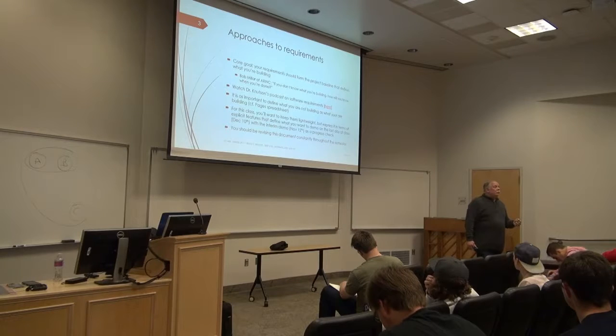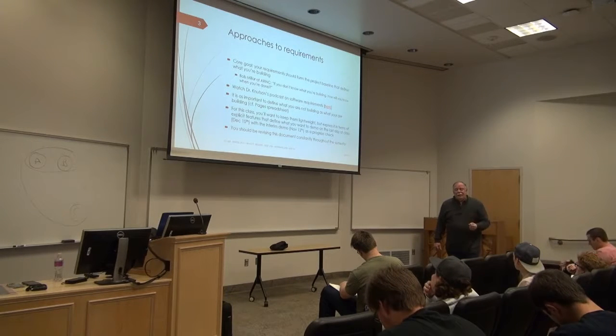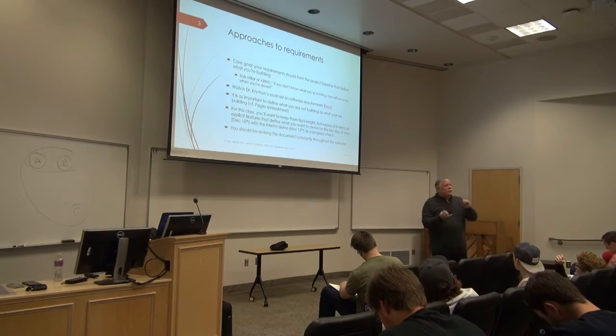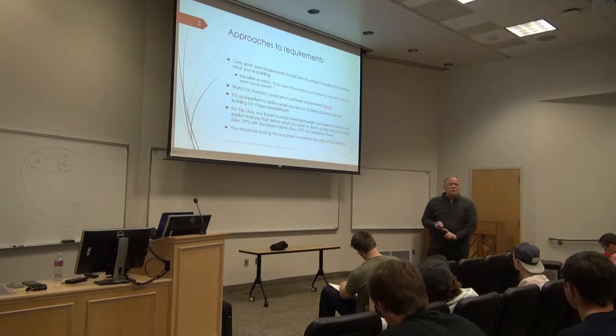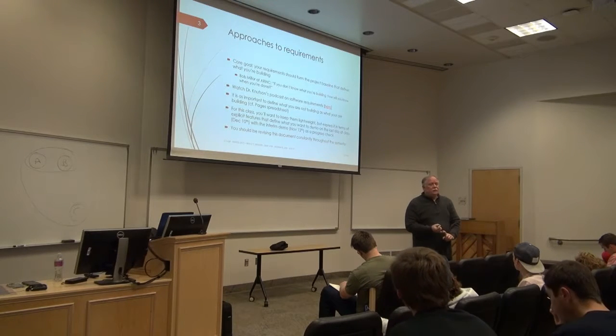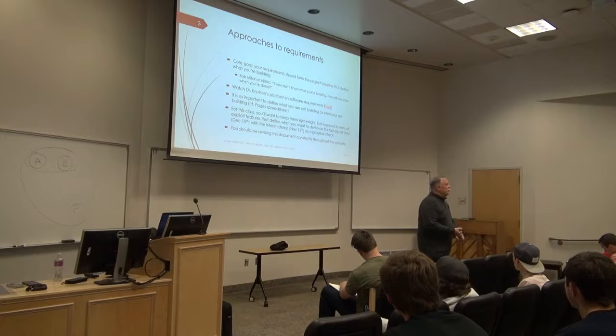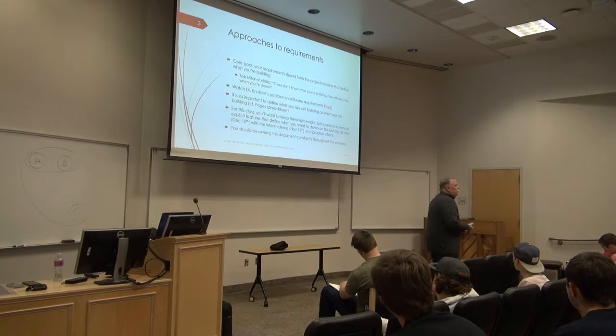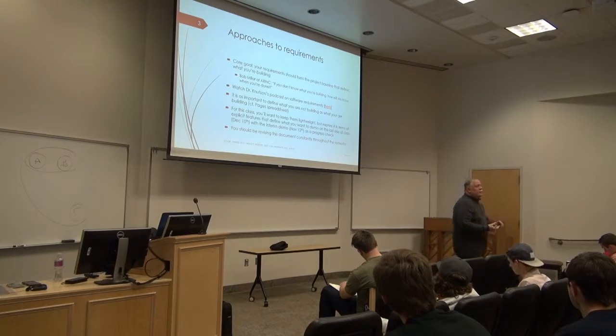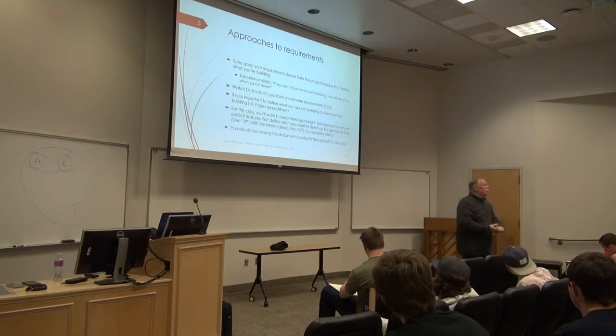And then we went through and ranked them as far as, here are the features that have to be in version 1.0 pages. Here are the features which we may build into a subsequent version of pages. And here are the features which we will never put into pages.